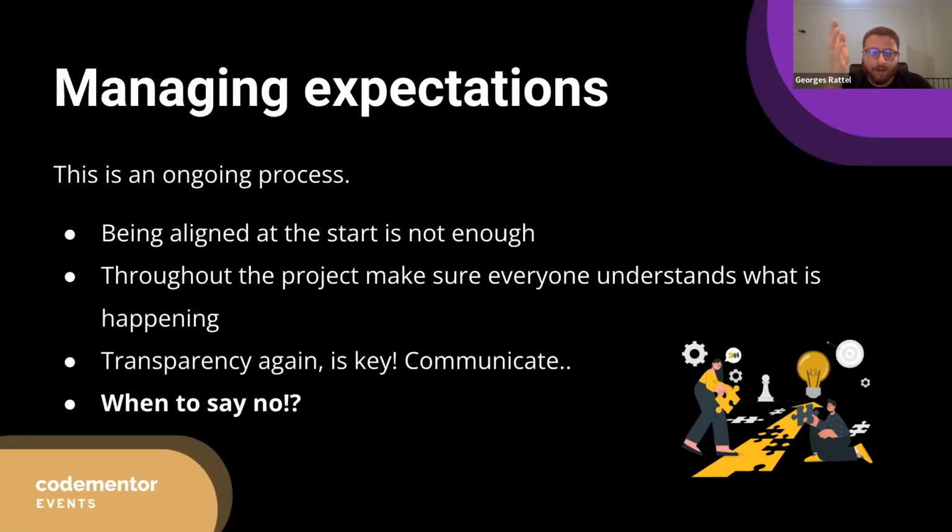And if this delay wasn't communicated clearly and the client wasn't really made aware of it, you're going to end up with a conflict, and the client might have other commitments that are also dependent on the release of the project, for example, marketing or whatever it is, and they will have damages. And regardless of how many features you've added to make them happy, they will end up feeling annoyed and let down.